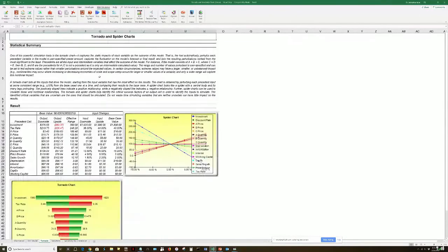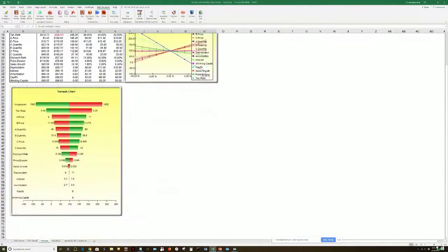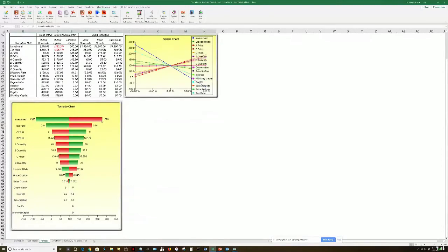And notice that this is nothing but a sensitivity table. So it tells you that your capital investment on here has the highest impact, tax rate has the second impact, price is third impact, and so forth. Which drives or moves the needle of your project the most, right? As compared to, in the entire model, you may have a lot of different inputs. What is most critical? You rank it from highest to lowest in this case. So that's what sensitivity, tornado, dynamic analysis does for you: it identifies your critical success factors.